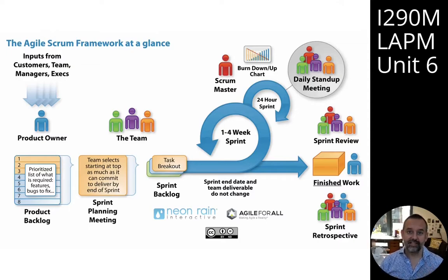I do want to talk about the daily Scrum briefly now because I'm not going to go into it in more detail. The daily Scrum is the meeting that the team has every day, and in that meeting you go around everyone in the team and they answer 3 questions. 1, what did I do yesterday? 2, what will I do today? And 3, any impediments or obstacles. And that third question is particularly important because that's how we as a team work out how we can help each other, and how as managers, delivery managers, product managers, Scrum masters, we can help unblock the team.